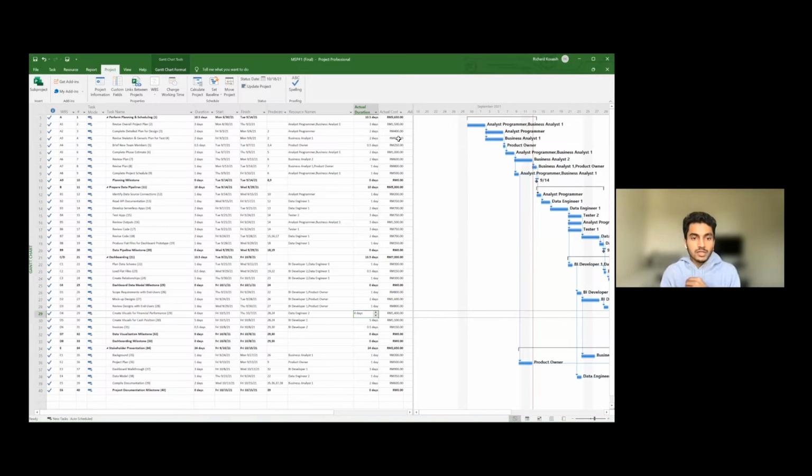Now I'm going to determine whether all of the requirements have been met. Firstly, I would like to talk about the major requirement, which is our completion date as requested by the client, which is to complete the project before 22nd October. As you can see from our project, our completion date is 15th October, which shows that we are on the track to success. All of our subtasks and main tasks have been completed on time within the allocated duration. And our resources have been efficiently allocated as well. There are no over allocation issues.